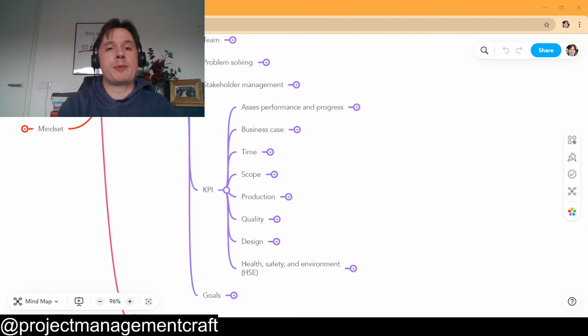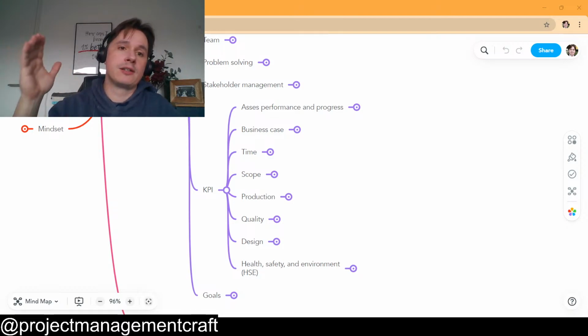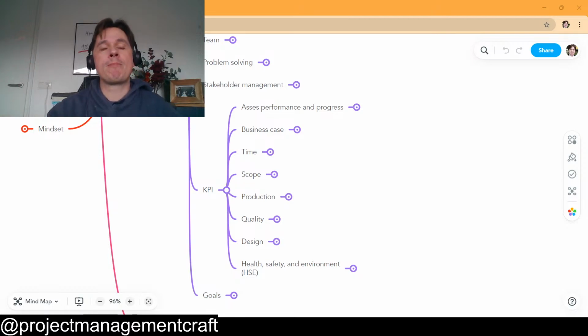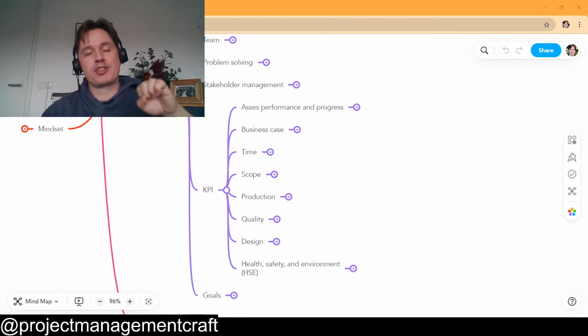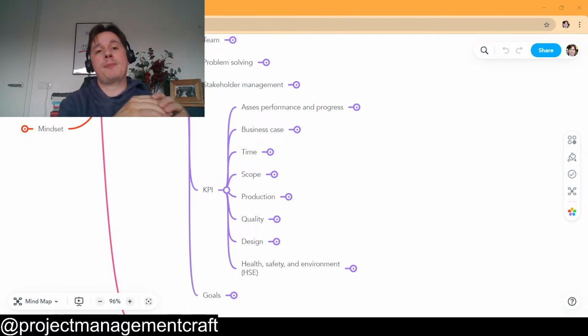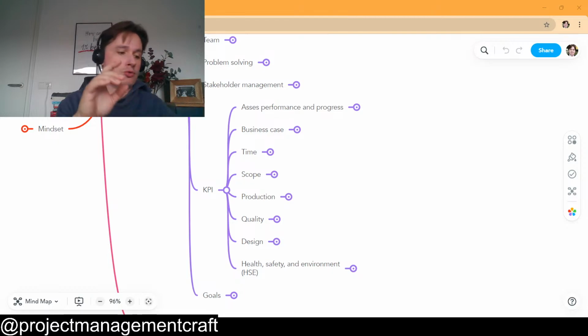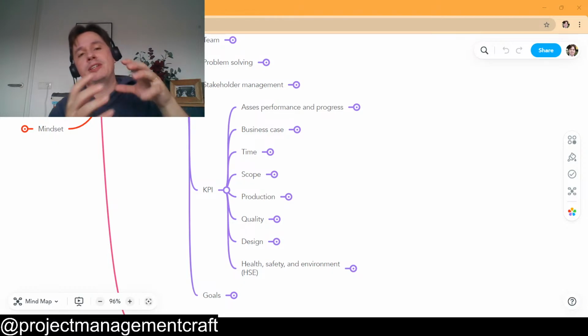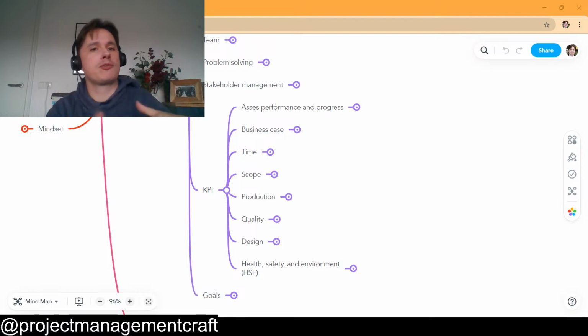For me, as a project manager, one key performance indicator was, of course, to track the time, to understand if I'm going to be able to achieve the project on time or not. And because this project was engineering, procurement, and construction, part of my project was in the design team. I had a design team that had to do civil design, mechanical design, and electrical design, to release the drawings and the design list of materials that I had to buy, so I would buy the material to organize the construction, the assembly, and the commissioning.